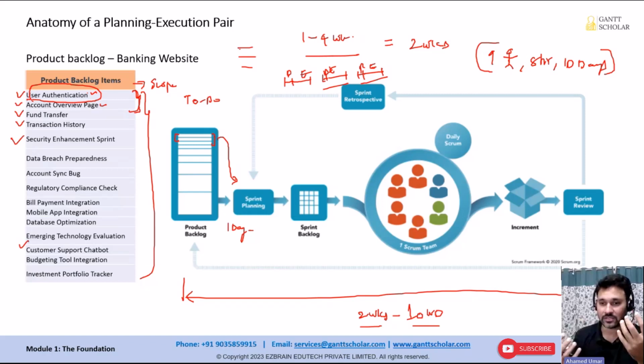Once they prepare the activity list, they do the estimation for each activity, how many hours it's going to take. For the first activity, we need 3 hours. For code review, we need 2 hours. To do unit testing, we need 5 hours. And who's going to do this work? Sam will do this work. Sandra will do this work. Karthik will work on this. Priya will do the code review. So team members will decide who will work on which activity. So they are doing activity list creation. They're creating resource planning. Who's going to work on which task?